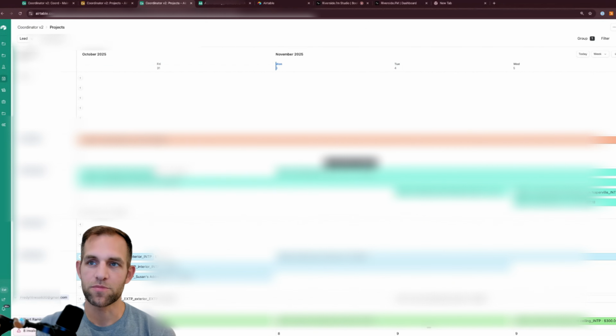The thing that I think is brilliant about this design is, first of all, it's very easy to make additional touch up projects. But more importantly, because we have this independent record of touch ups, of punch lists, whatever you call it, we can now go back for our clients and say, hey, did you know that Carlos on 10% of his jobs has touch ups that he's going back and doing, whereas everybody else is at 5% or less? And you could also see maybe there are other trends that you could extract because we're tracking that punch list as an independent thing.